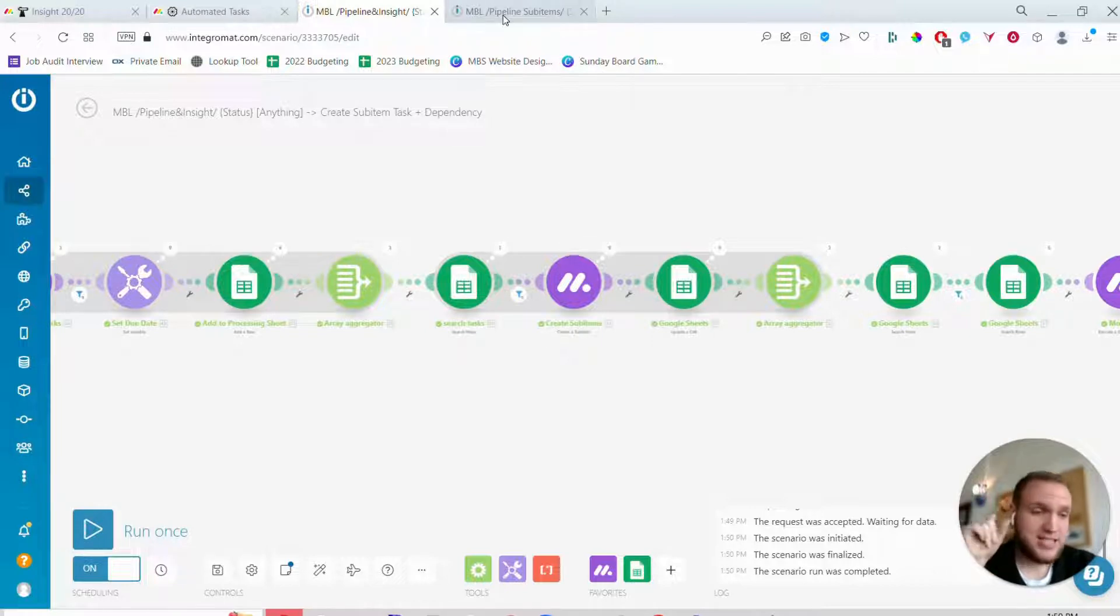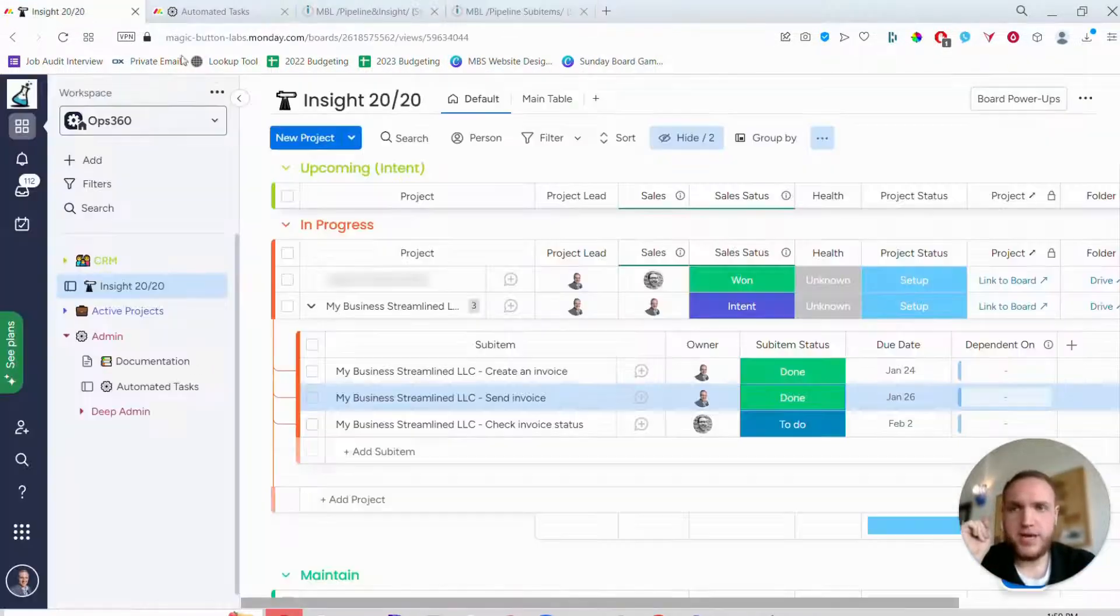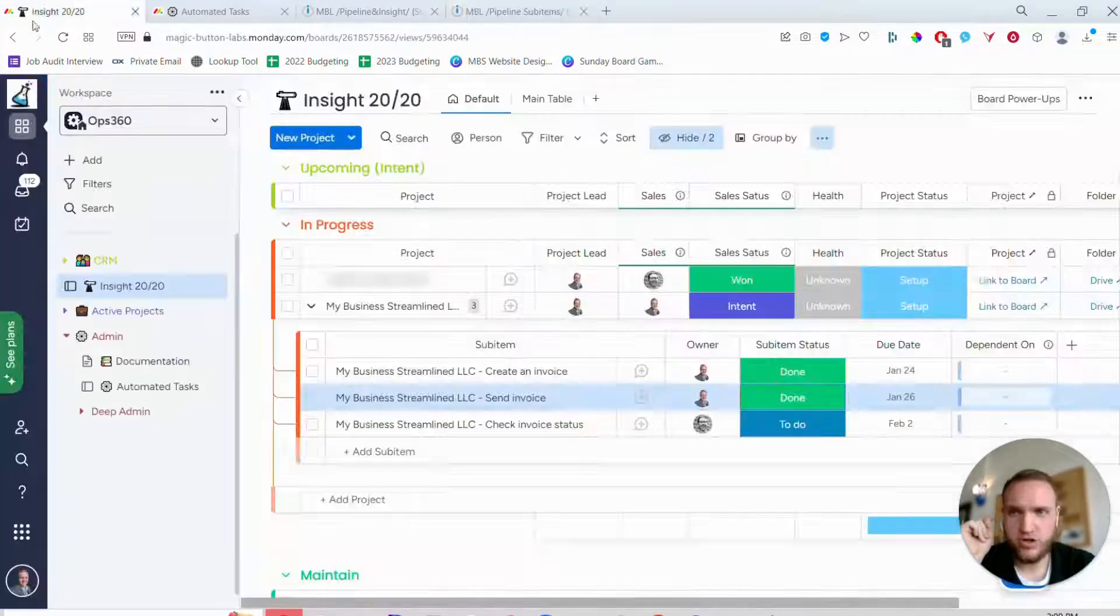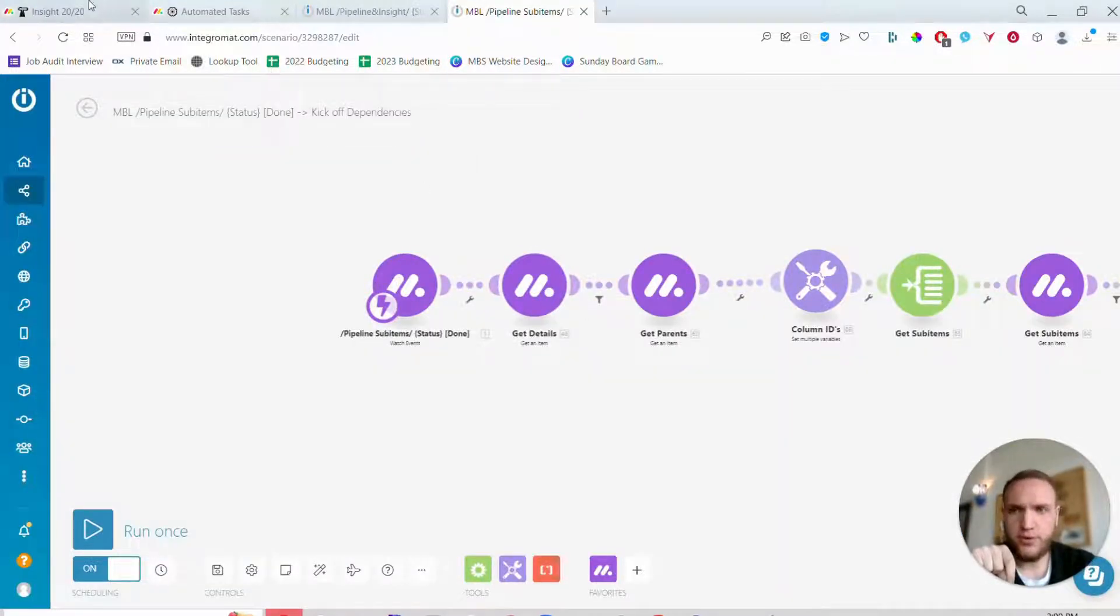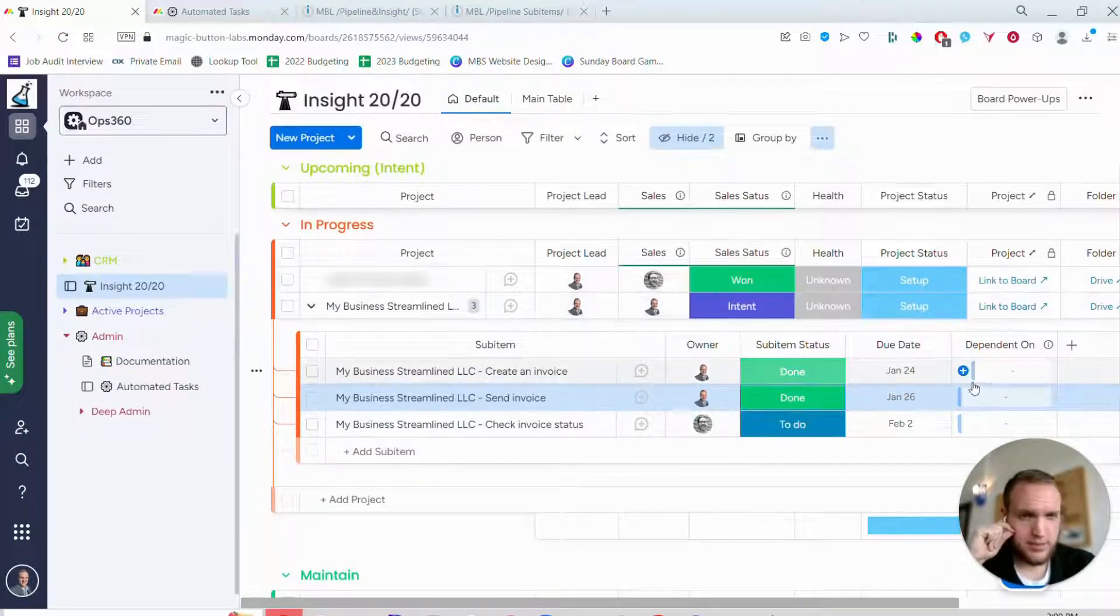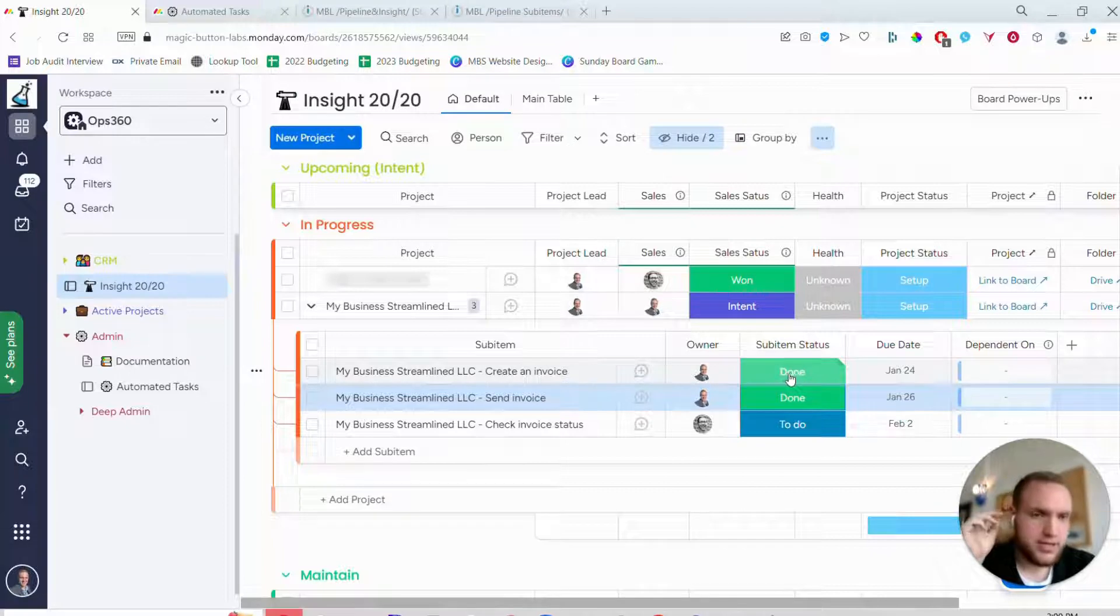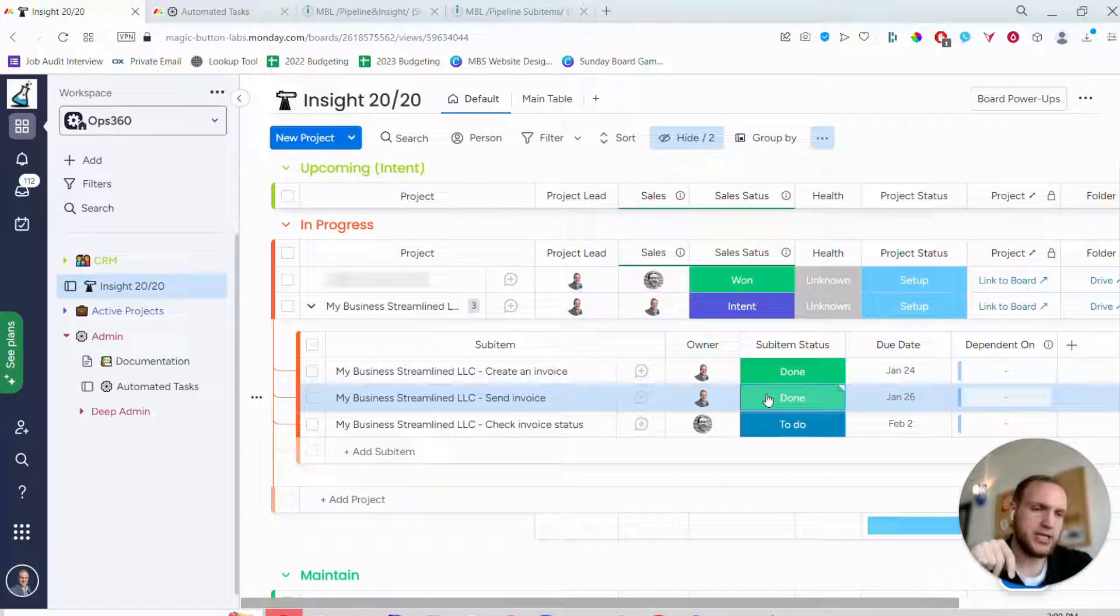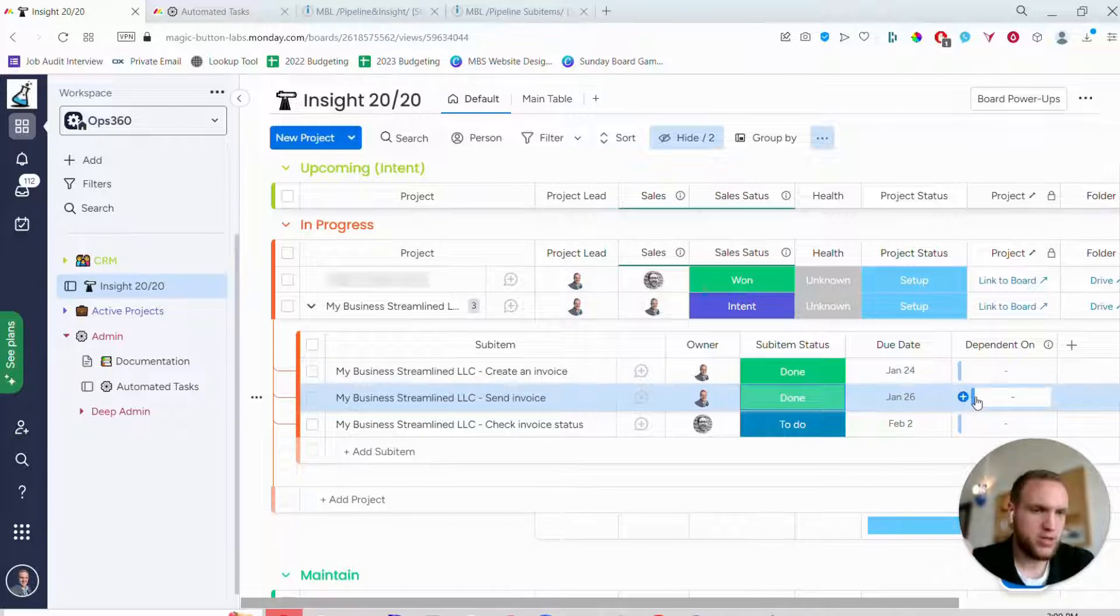The second integration is also with Integromat and this is when a status changes to done. So when any sub item status changes to done, it will look through the rest of the sub items underneath that same item and it will say, are there any tasks that were dependent on this one being completed? And if so, then change the status from whatever it was before to to do. So it kicks off the next task and then that will also remove the dependency here because the dependency is no longer with them.